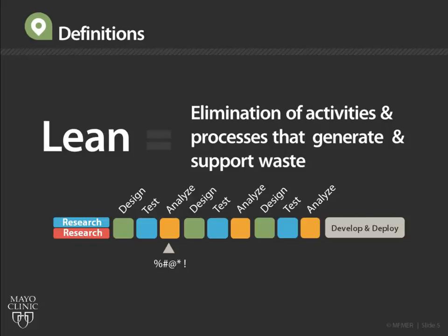Each time we did this, we'd find more bugs than we would have if we had only gone through the cycle once. Then at the end, we could be more assured that we would have a finished application that meets the needs of the end users, and we wouldn't have to disappoint people with a buggy first launch and lock ourselves into a mandatory phase 2 that we weren't counting on happening. Believe it or not, even though this looks like more work, more iterations, this is in fact a lean way of working. Design just enough, build just enough, and test your theories. When you do it over and over, you find and you fix errors and problems that make dissatisfied end users, and you ensure the overall success of the whole project.